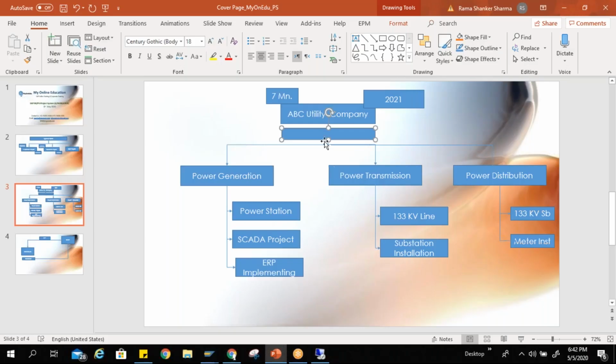In my application, I need to create one top level program position. You can correlate with your PS project structure where you keep one WBS as a root and then create further level WBS elements. Similarly, we are creating the structure here.